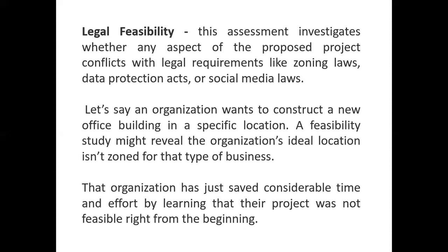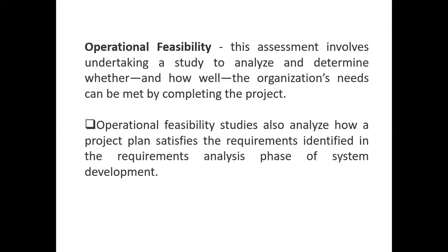So let's say an organization wants to construct a new office building in a specific location. A feasibility study might reveal that the organization's ideal location isn't zoned for that type of business. That organization has just saved considerable time and effort by learning that their project was not feasible, right? So they'll save. And then operational feasibility.